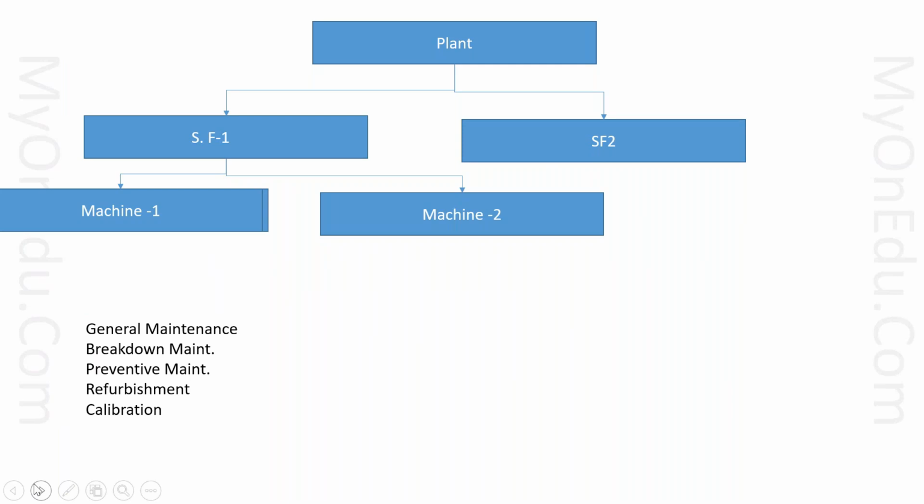So these are the maintenance processes available in PM, and whenever we are performing any maintenance, we need to create a maintenance notification, and we need to create a maintenance order. When we are creating a maintenance order in PM, the same order can be linked to a WBS element or network activities. This is the integration point of PS and PM.